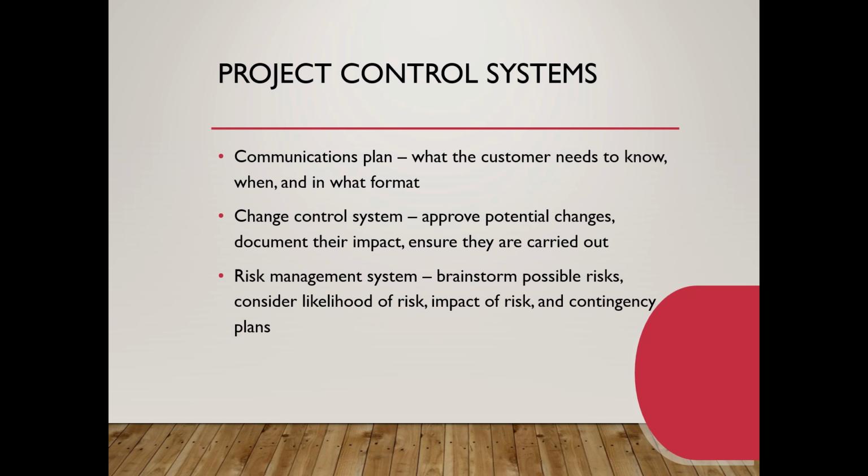We need to have a very individual-specific communication plan for each stakeholder, and there is a formula: if there are n stakeholders in a project, there are n times (n plus 1) divided by 2 communication channels that need to be designed.